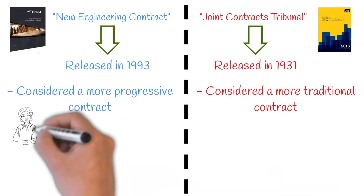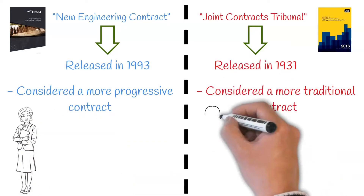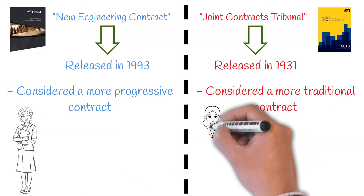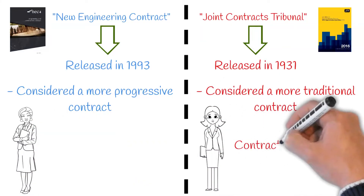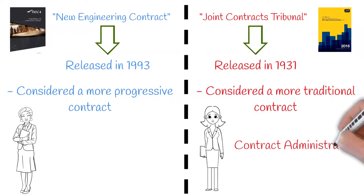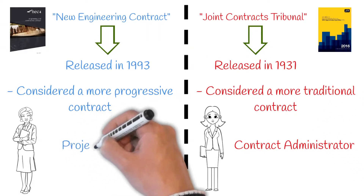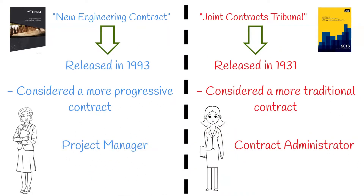Each contract appoints a person who acts on behalf of the employer. For the JCT contract they are known as the contract administrator, and under the NEC they are known as the project manager. Let's look at how these contracts are administered differently, split down into two key areas: time and cost.